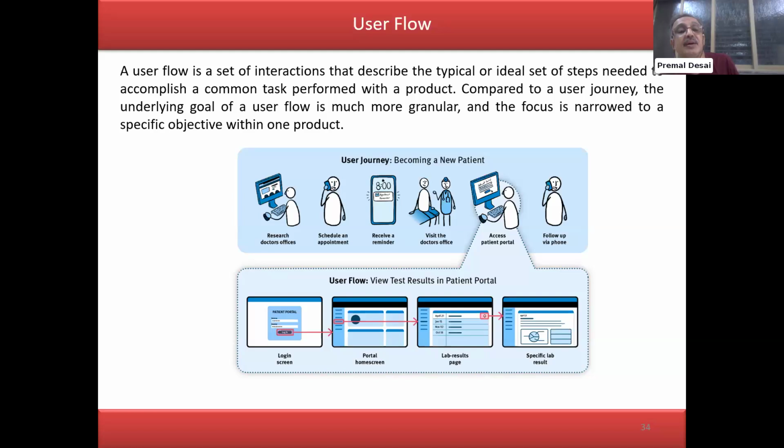Understand why the team is failing to deliver the committed user stories, committed velocity, committed delivery. As a Scrum Master, facilitate why this is happening and try to do a corrective preventive action, what we call CAPA, and see whether this can be changed, or whether the requirement is not correctly coming in.